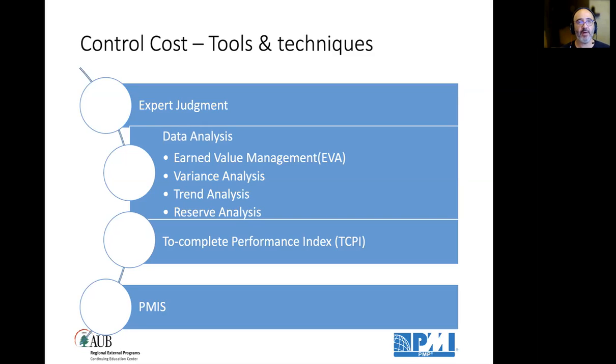If a negative risk happened, it's a threat, and you take from the contingency reserve. If a positive risk materialized, it's called opportunity, you put back in the management reserve, and the net is what is remaining in the contingency reserve that you can use for any identified risks on the project.